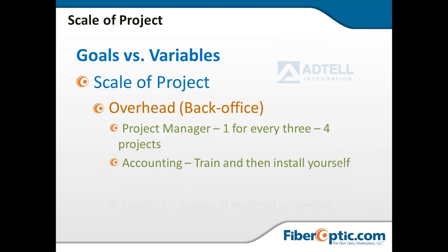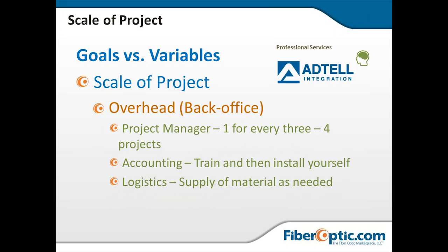So project managers, we definitely recommend probably one for every 3 to 4 projects. You don't want to send technicians into the field without understanding the logistical and accounting and management support that they need in a back office scenario. I would definitely recommend that you see value and allow people to have project managers on the job to get it done correctly. A lot of people want to project manage the team in the field themselves. You shouldn't overpay for project management, but I really recommend you see value in that.